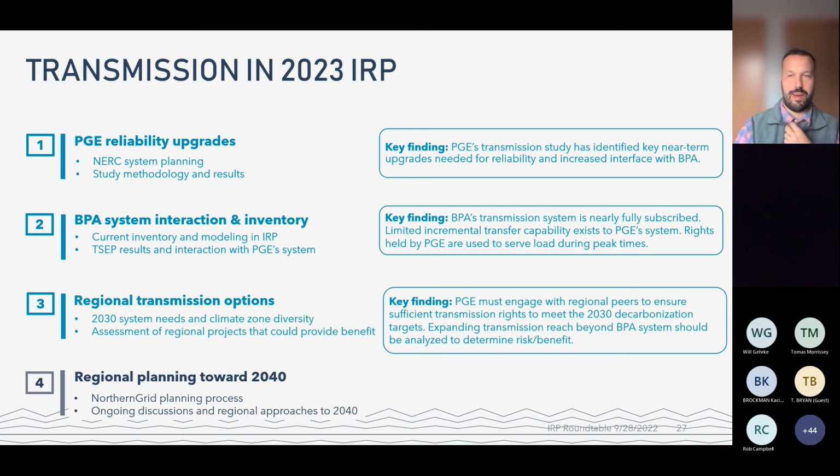Thanks. And the other thing I'll point out, you guys probably know this, but maybe the rest of the community doesn't. When I was discussing with Bonneville, they said we have to figure out when Portland General would like to take an outage relative to a 230 line, and the substations, right? And we might need a year for that. So it really will be a brand new separate power line entirely, and lots of fun stuff. Thanks. Yeah, point well taken, Jake.